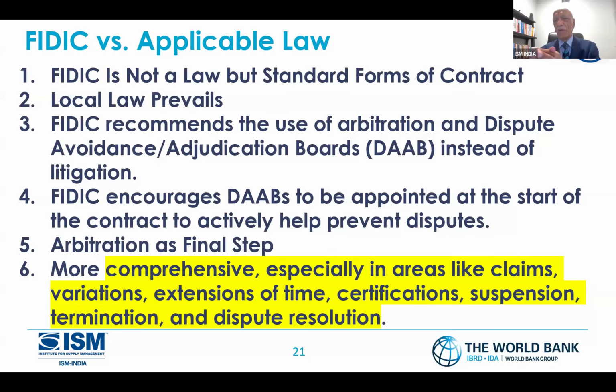FIDIC encourages the DAB to be appointed at the start of the contract. But I'm not asking you to do it for 10,000, 20,000, no. If you're doing a contract of more than $5 million, then yes. But it helps a lot. I don't have to get into the trap of litigation. It is more comprehensive, much more detailed. No contract is more detailed than this, especially in areas when it comes to claims. So when it comes to claims, this is super.